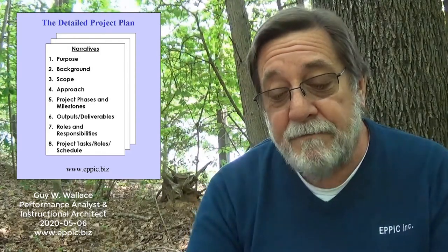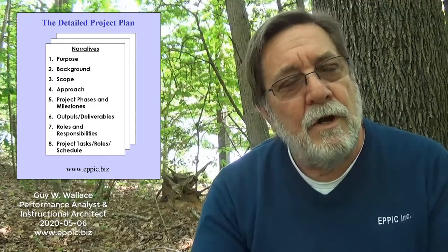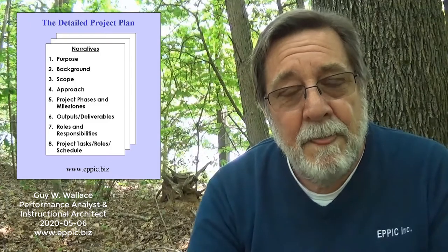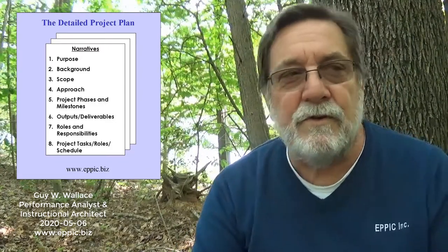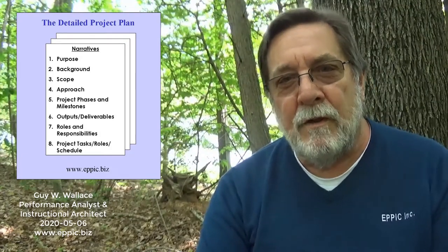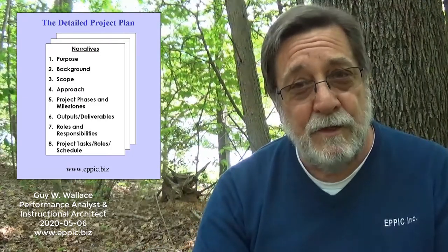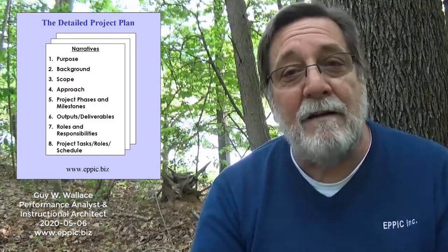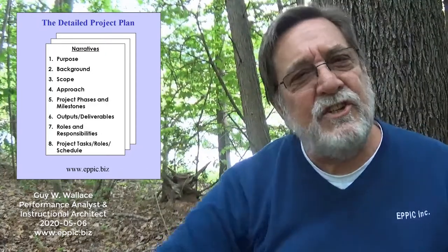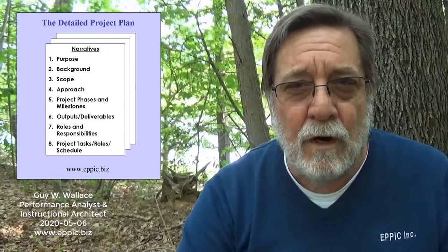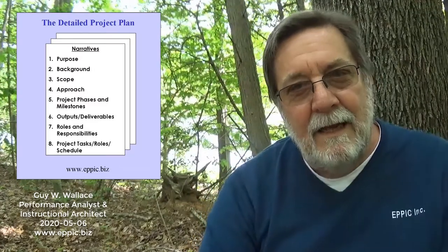The next section of the project plan is project phases and milestones. Now, I have a standard set of those. For curriculum architecture design, I have 4 phases. For modular curriculum development and acquisition, I have 6 phases. But if my project is part of a larger initiative, and they already have stages or phases or whatever they're using to create milestones for review purposes, so that people don't get too far down the road before somebody has a chance to review and approve, modify, or reject what's been produced, I need to modify those things at times. And I might have to include my analysis and design phases as one stage in somebody else's project management framework. After all, things like ADDIE are just a new product development framework for project planning and then project management.